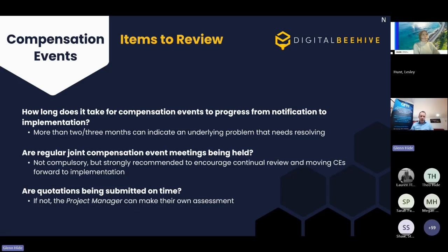And I was going to add to one of Lesley's great points about not having a commercial presence. Personally, I ban QSs from early warning meetings. When I say that in training, there's a little bit of a gasp, but then I explain, look, I'm trying to do it for you, because you don't need to be there, because this isn't a commercial matter yet. It might not be a problem, but if it is a problem, you can pick up that baton, that mantle, at some point in the future. And then if we're having a compensation event meeting, that's when you can discuss the compensation event. So try and separate early warning meetings from compensation event meetings, even if it's with a coffee break in between and then maybe different people attending. We should separate those two elements.